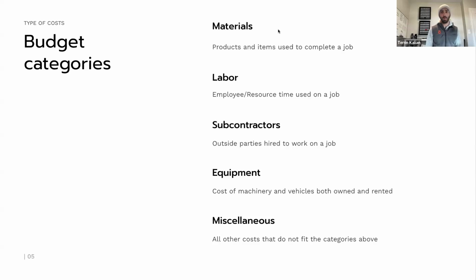But for the sake of this webinar, when we're talking about budgeting, this is how much we expect to spend on all of that. So I may not know who actually is tracking time when the job's live, but I could say we're going to need a foreman, and we usually spend $80 an hour on foreman time. Things like that help us build out labor budgets. So I could see how much time will we spend on the job, and how much will that time cost us potentially.